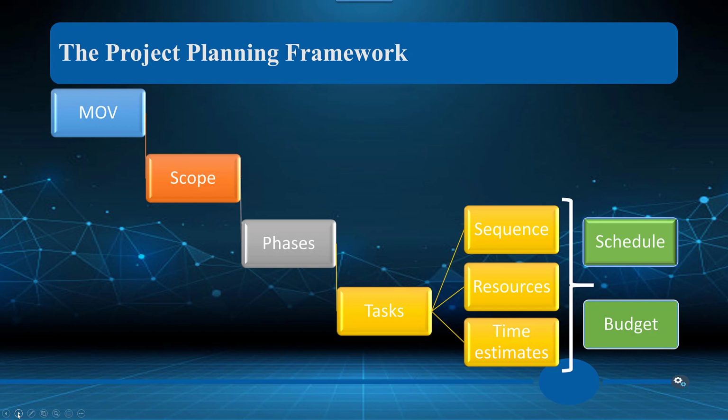And of course the budget. So how much are those resources going to cost us? Remember, time is money. So consequently, time that we put into a project is going to need to be included in that budget as well. We're taking those human resources away from their daily activities, and thus we need to include those resource costs into the budget.